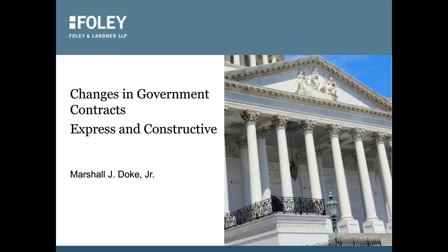Now we'll cover a little on equitable adjustments. If the government's policy is to change orders prospectively, that's the policy of the government. Now, the meaning of equitable adjustment becomes the trade usage in government contracts. As used in the changes clause, equitable adjustment means a correction of the contract price that will keep the contractor whole. The equitable part of the adjustment means the difference caused by the change.